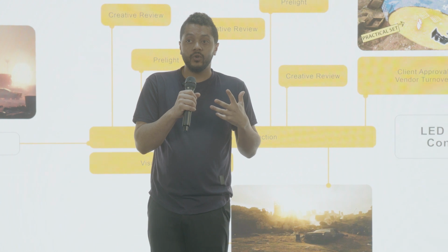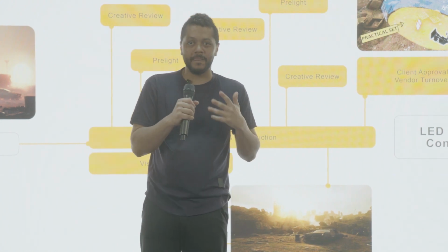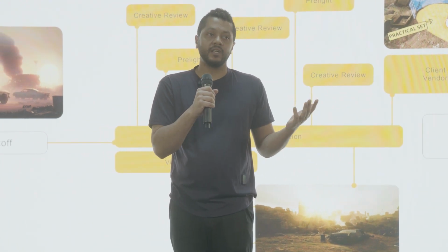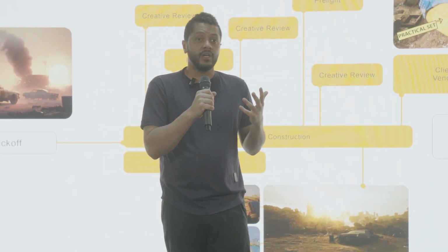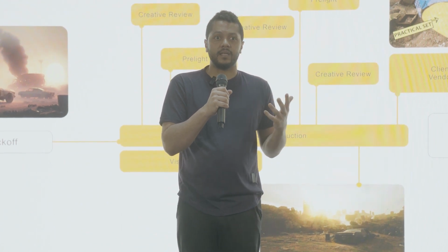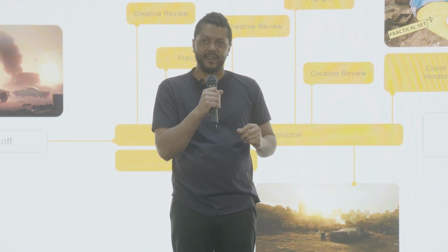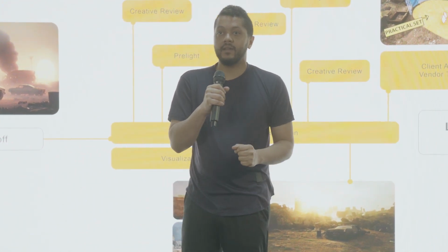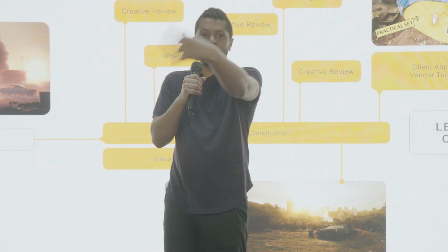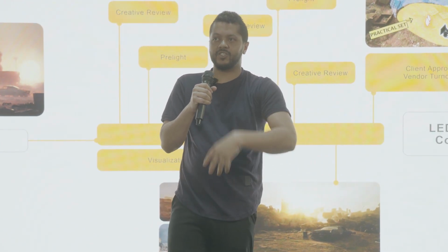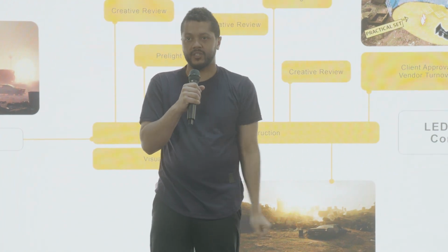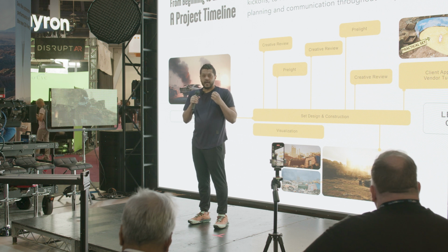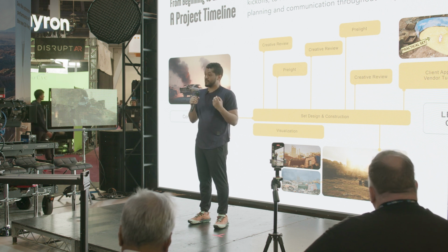And if you don't have that role and the decision power to have that, then you are going to build way more than you need. A cinematographer is often making decisions around lighting. Hey, make it darker. That's a cheaper set. Hey, this is a 50 millimeter lens. It's out of focus. That's a cheaper set. Hey, I actually don't want to look at this area with hundreds of props like a junkyard. I want to look at this wall and a tiny little bit of the junkyard. These decisions are what make these things actually come in on budget.